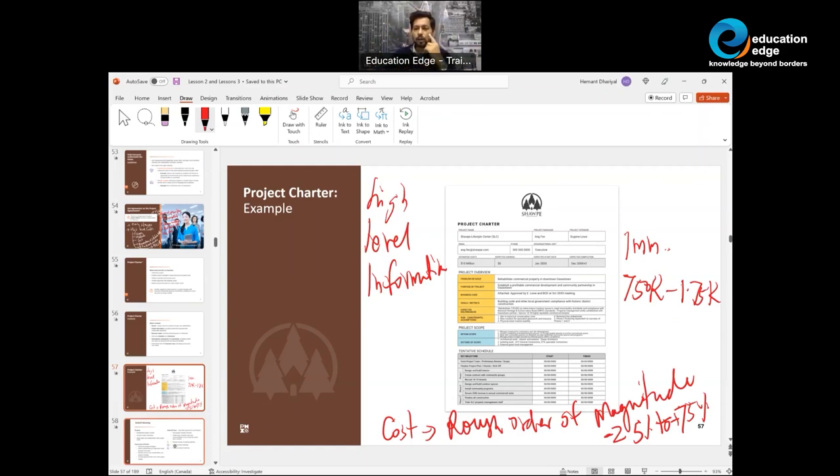In our organization, you may hear things like L1, L2, L3 estimates. These are the earliest estimates, because we only have information available at a very high level. Because it is at a very high level, that's why the range is wide. When you go into planning, you start getting definitive information, and at this time your estimate range also starts shrinking. You may use tools such as the work breakdown structure to increase the accuracy in this estimate. So at the end of planning, it's not rough order of magnitude anymore. It is definitive order of magnitude.